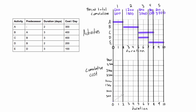At the end of period one we plot $600. At the end of period two, the cumulative cost is $1,800. At the end of period three we jump up to $3,000, then $3,500 at the end of period four, and finally $3,700 at the end of period five — which is the total cumulative cost of the entire project. And there you have the project S curve for cumulative costs.